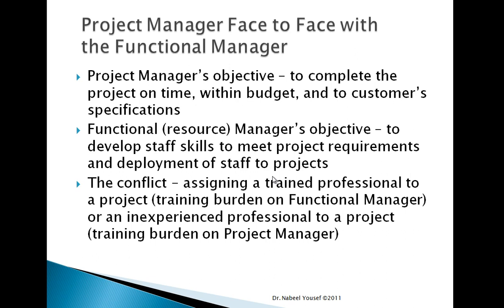Most of the time, the functional manager has more capabilities or more control on different projects than the project managers. That depends on the structure of the company. Some organizations are structured in a functional way or a matrix. If that's the case, then the functional manager is the one who takes over, and the project manager will have limited authority, maybe even no authority whatsoever.